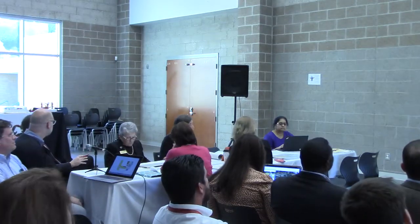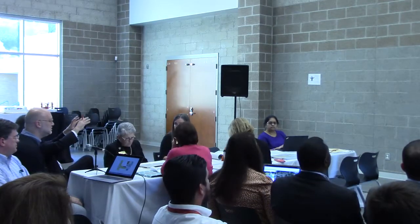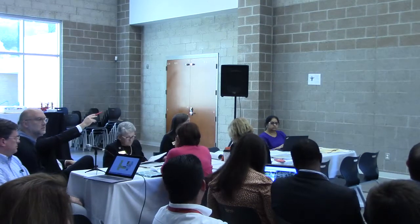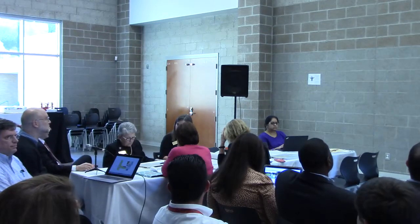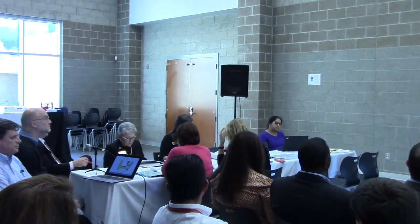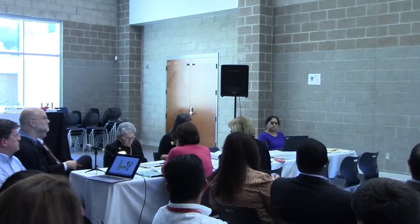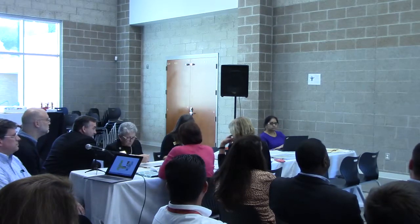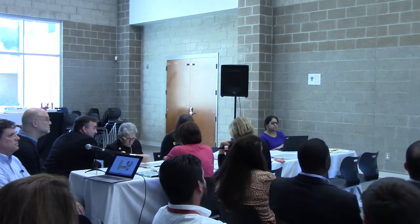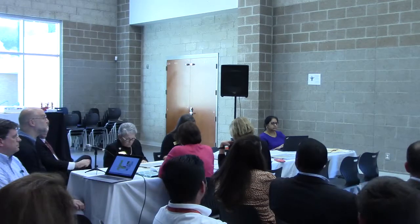The first thing that you'll see that's different from the previous time is that we had essentially a box before, where the classroom wings were connected by glass hallways to this upper hallway right here and also this back hallway right here. We've had to go in several times and dramatically cut costs from this building. One of the costs is the amount of external wall that you have. So that was one of the things we had to give up in the design process, and it was kind of sad because we lost our village feel, but we knew it was going to be a lot more expensive. That's why you see the fine arts essentially twisted down out of this white space, next to these buildings, because now I have one external wall here and I'm not paying for those glass hallways in between. That was something we cut for cost purposes.